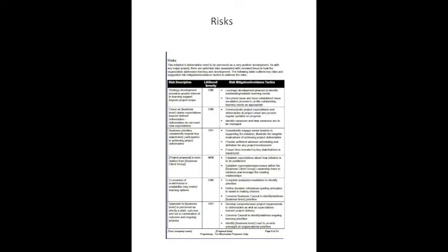And the third thing that you have there as an input is potential risks. So with your client's help, you're going to identify risks. You're going to identify the likelihood and the severity of those risks. And finally, you're going to talk about potential mitigations or avoidance strategies to actually address the risks if they do arise throughout the project. So everybody's on the same footing as they get going on the project, and it's something to go back to.